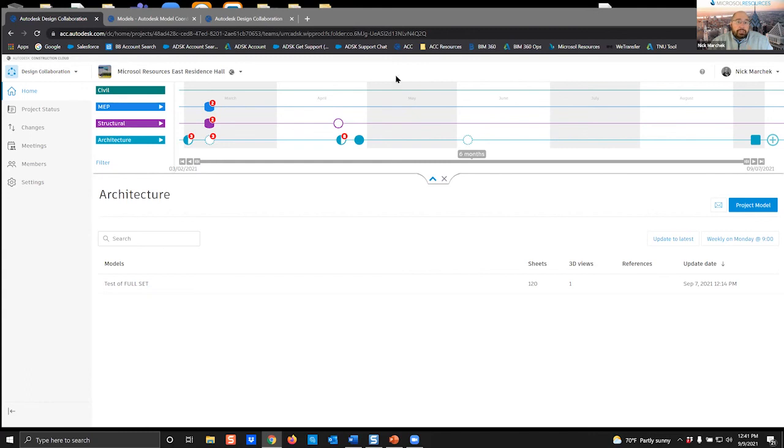If you go about using the process of publishing and consuming packages, you would then be able to use this timeline tool that I'm showing on my screen up here. This is a way to view and manage various teams and models, as well as track project milestones. You can actually see here various nodes. So you can see who has published packages, when, if they've been consumed, assumed, etc. So basically, you're given the ability to track all of the deliverables between your project teams, where you can confirm that everyone was working from the most recent documents and models.